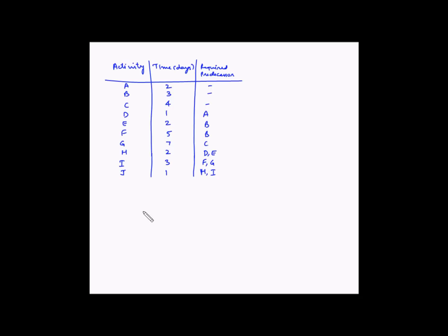Now let's draw the network diagram. The first three activities, A, B, and C, do not require any predecessor — no other activities need to be completed before they start — so they become the starting activities of the project. We'll draw the start node and number it as one, and from this we'll draw three arrows representing A, B, and C.